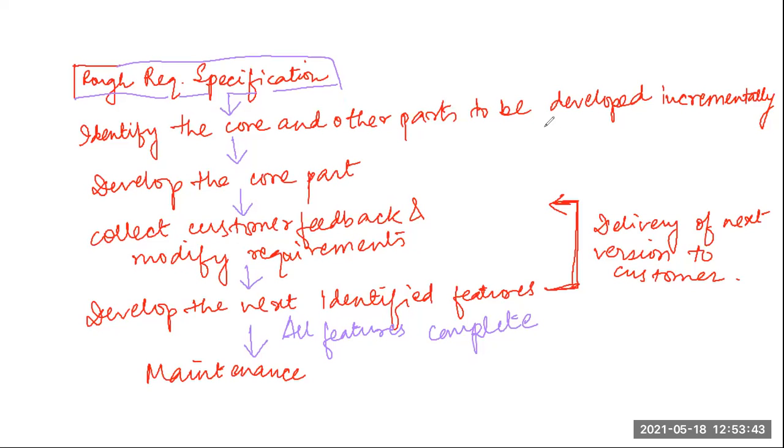And obviously, since I am giving versions in an incremental approach to the customer, handling this type of change request is easier, as long-term plans are not made here. Short-term plans are made. If I give module A, they say okay, module B, they say okay, module C, they say not okay, then I will identify that some problem is there in module C only.